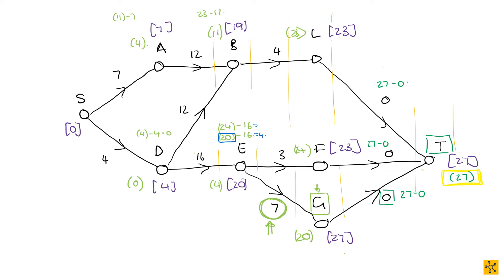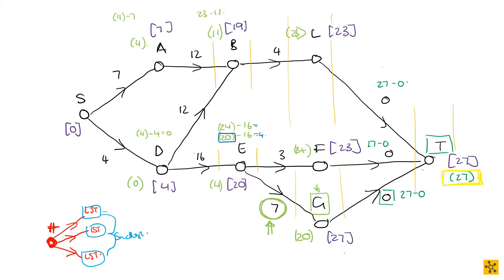Just to recap the entire process: you have the vertex you're investigating the latest start time for. You look at all the arcs radiating out of it and look at their latest start times. You select the minimum from this group — the smallest — and then you take the smallest minus the weight of the arc radiating in towards this vertex. That gives you the latest start time of that particular vertex.